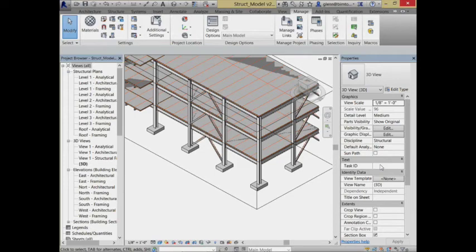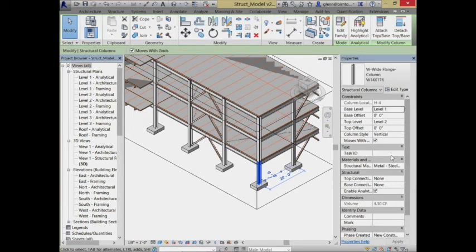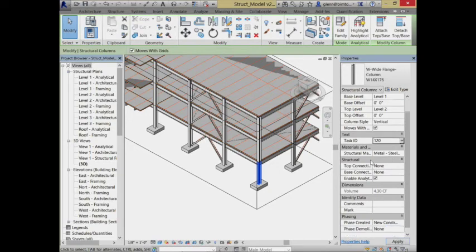Okay, so now for that first floor column, what do we want that to be? That was 120. For that second floor column, I'm going to make it 220. For that third floor column, I'm going to make that 320. Again, where am I pulling those numbers? That's just a numbering scheme that I came up with for the different tasks. So I'm just mapping items to tasks, schedule tasks.